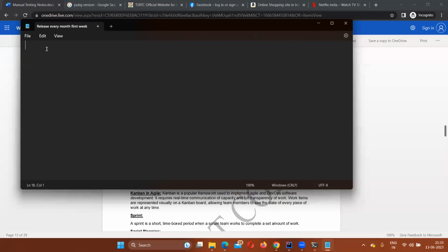So let me explain. Sprint is the time duration to complete whatever work is assigned to you for that particular sprint. Each sprint you will be assigned some work. To complete that work, you need some time or duration, and that is called your sprint. So how long does a sprint last? Most commonly it's 2 weeks, but this is not a rule. It's not a rule that every sprint should be only 2 weeks. This is a common practice. You might have 4-week sprints, 6-week sprints, sometimes even 3-month sprints. You never know. It's project specific. You cannot say anything. All right.